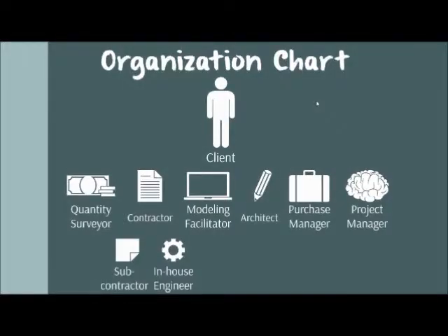For the organization chart, our client is the Department of Real Estate and Construction. Quantity surveyor, contractor, modeling facilitator, architect, purchase manager, project manager will enter direct contract with the client, while subcontractor and in-house engineer will enter contract with the contractor.